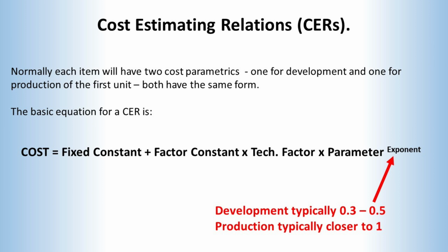However, there are other factors which lead to expectations about the value of the exponent in the cost estimating relation. We saw that the exponent for production aircraft was 0.93, and for production items we would expect an exponent value in the upper part of the range, like this. However, development programs have a much weaker dependence on size, with exponents closer to 0.5.